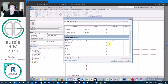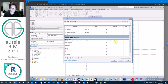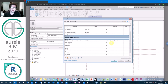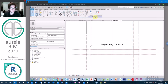I'll take the reporting length, copy its parameter name, and set up a formula: cost alternate equals report length times one dollar. If I try to finish this formula it gives an inconsistent unit warning because we're multiplying length times currency. The problem with a length field is it maintains its unit, so you need to divide by a millimeter to manage the unit out. This rationalizes because we're canceling units — similar to canceling out negatives. The same applies to square meters and volume: divide by meters squared or meters cubed. Now as the beam changes length, it should adjust its cost as well.